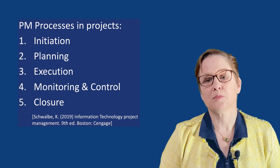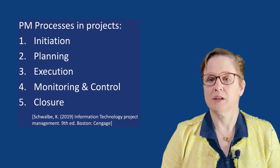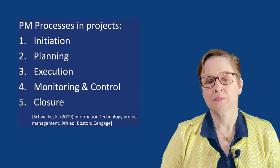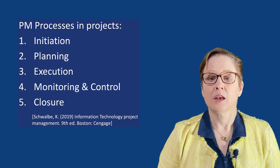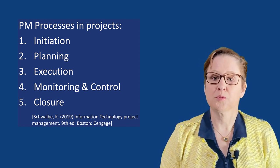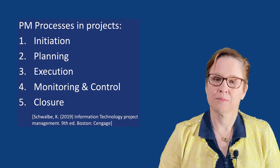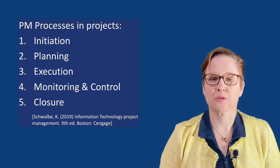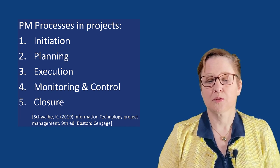The initial phase of the project, where you set goals and identify your stakeholders. The planning phase, in which you define scope, roles and responsibilities, and create a plan. The execution phase, where you allocate and manage project resources and build the project or process.